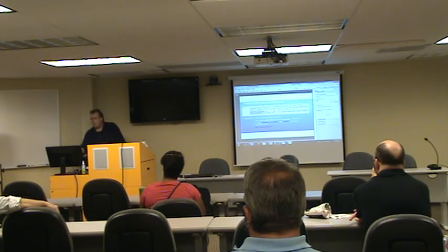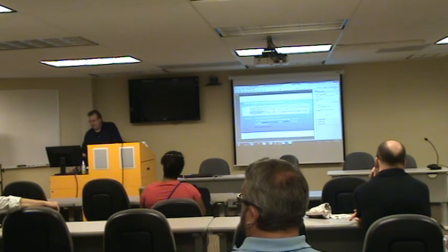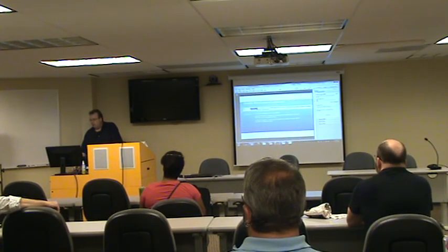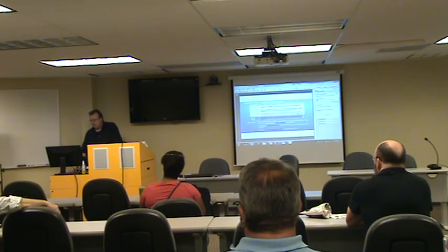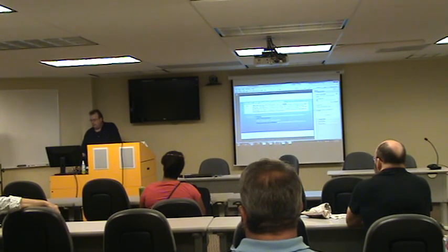But anyway, back to your question. This old other one really gets more into the depth of what the pieces of the contract language say and why they say it. So, what's an over-the-shoulder progress review, what is interference management, what's a visual check, what you submit, an IFC file. Within 30 days after acceptance of the PXP, you have to demonstrate the plan. If you don't, the government will withhold payment. So things like that.